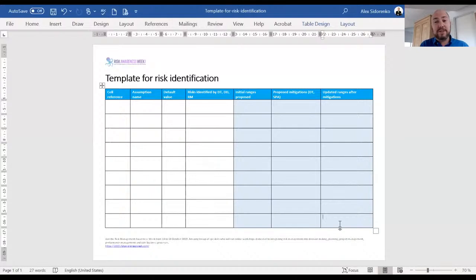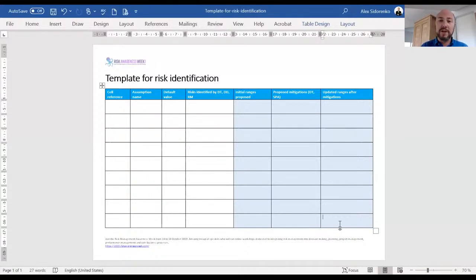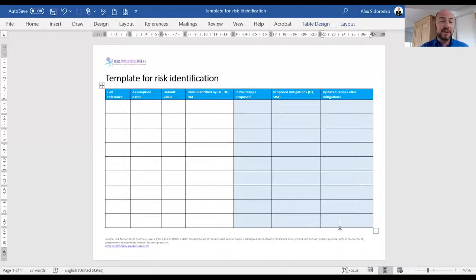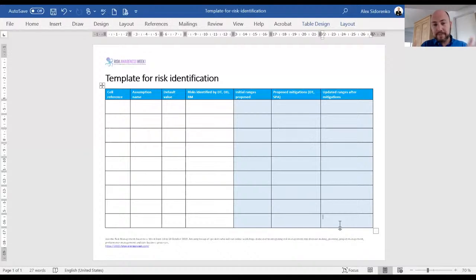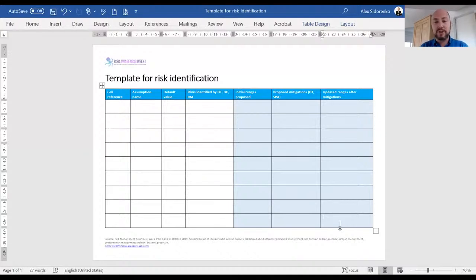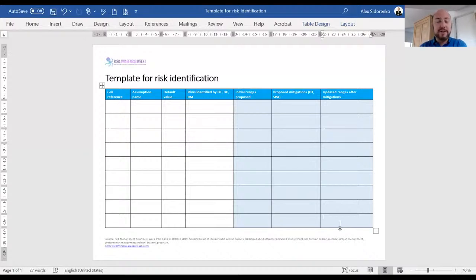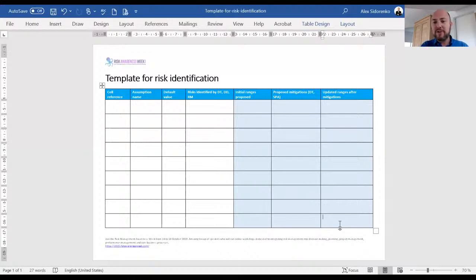But the decision makers may say, no, I'm not comfortable making that decision. I still need more information. So you go back, you investigate, you maybe get a budget to investigate additional mitigations. And then you rerun the simulation the third time, based on all the additional analysis work carried out by the risk team and the team that was preparing the decision making. And that's how you keep information about risks.